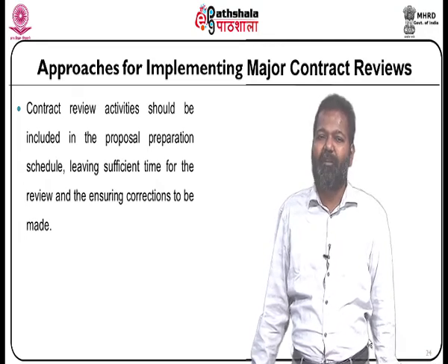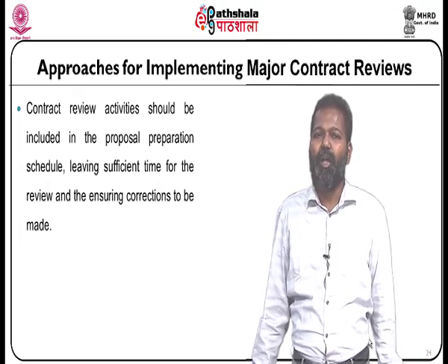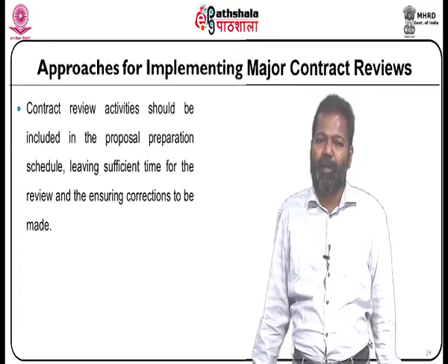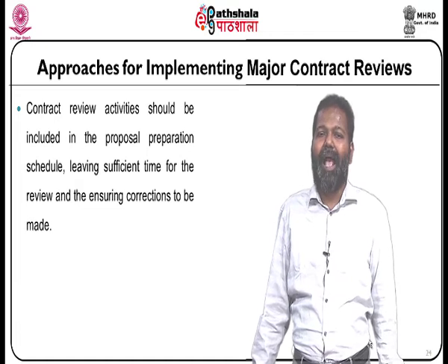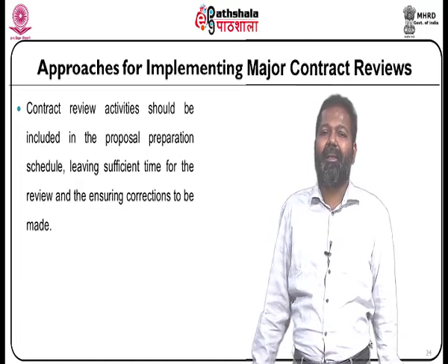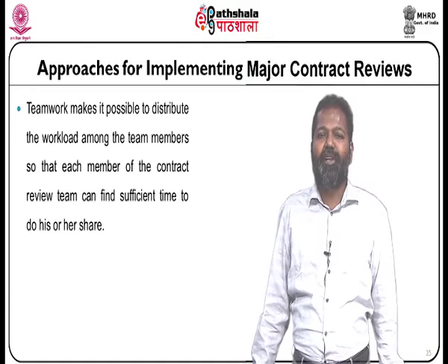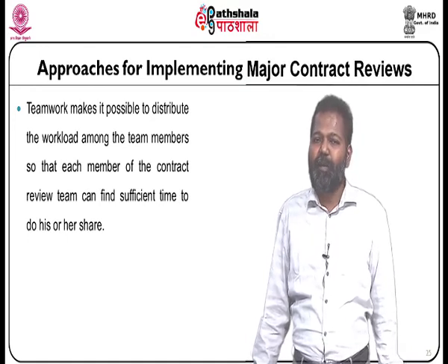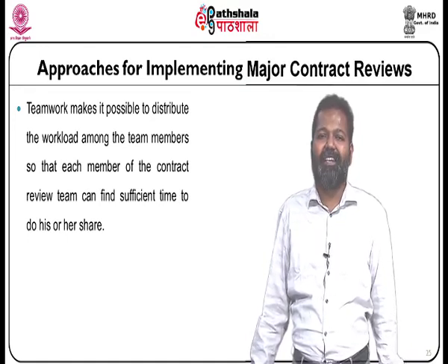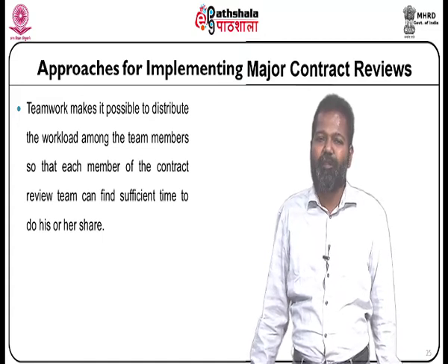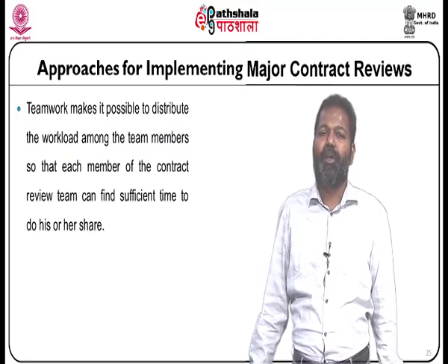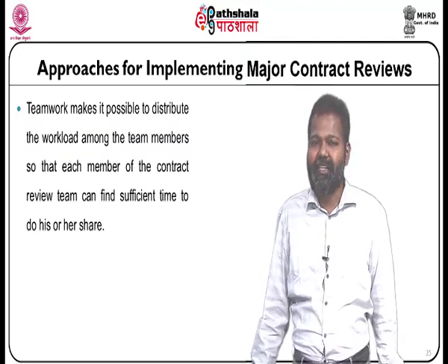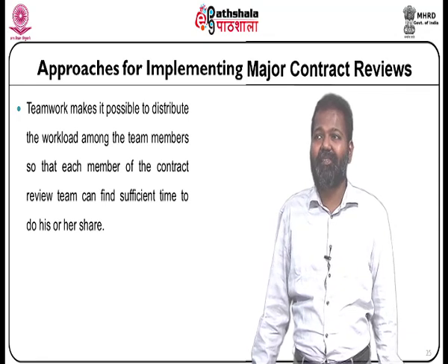Contract review activities should be included in the proposal preparation schedule, leaving sufficient time for the review and ensuring corrections to be made. Teamwork makes it possible to distribute the workload among the team members so that each member of the contract review team can find sufficient time to do his or her share. Team dynamics plays a major role here.